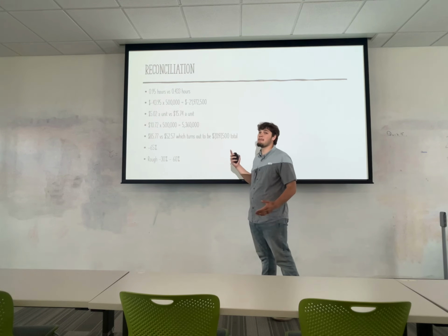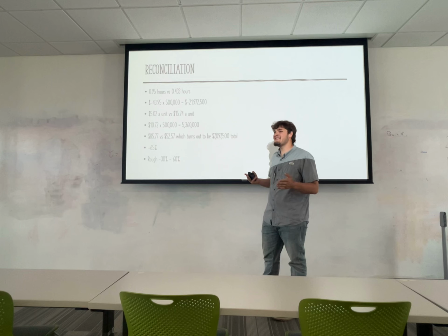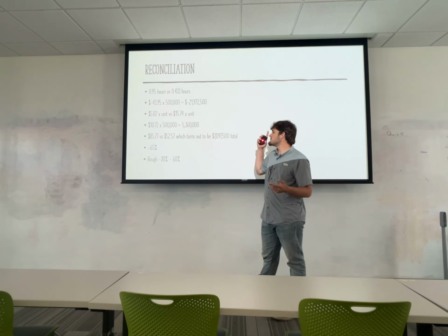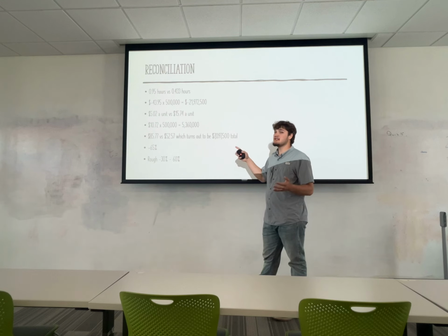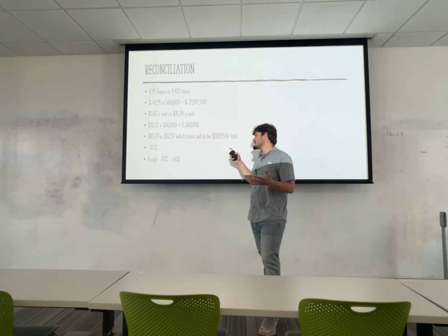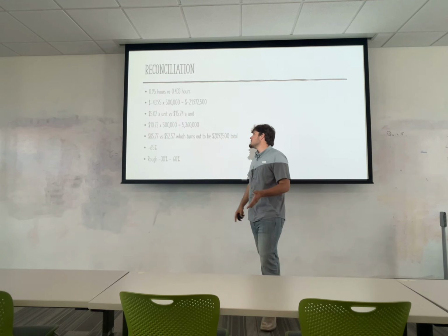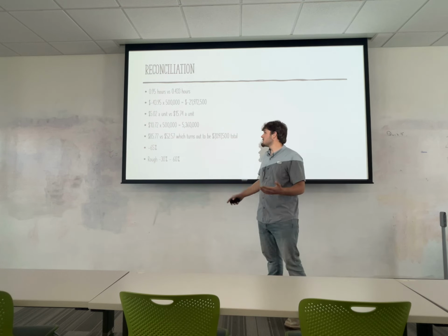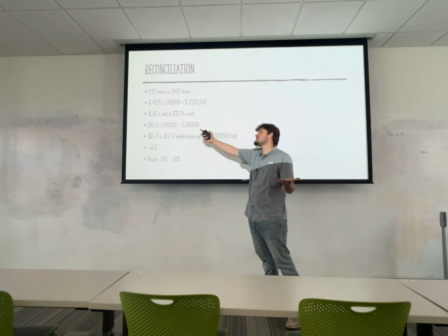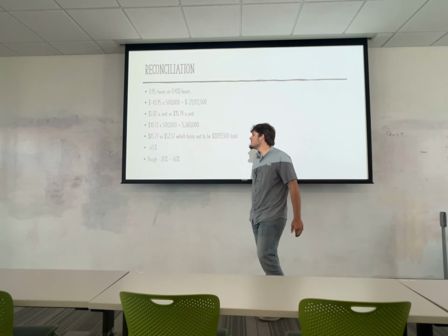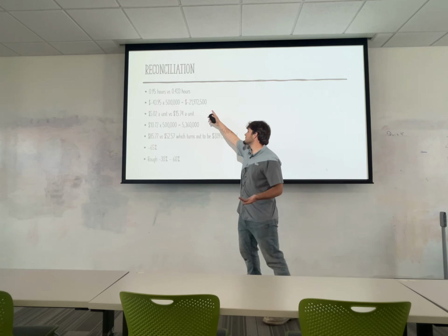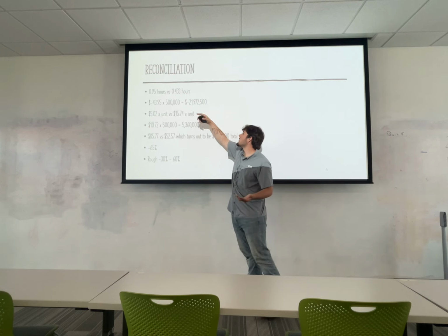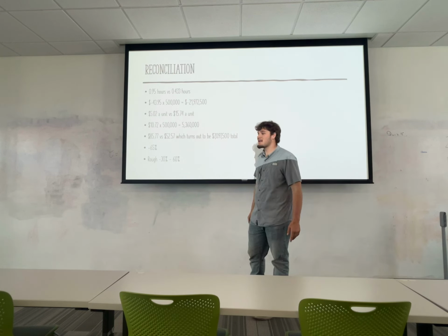And then we have my part cost, which this kind of saved me, but not really because it's ending up what screwed me in the first place. And so I charged $5.02 a unit for the parts, and the actual cost was $15.74 a unit. And so what happened, once again, it saved me $10.72, which comes out to $5.3 million, which sounds great, but we also have to remember I spent almost $22 million more on my labor costs.